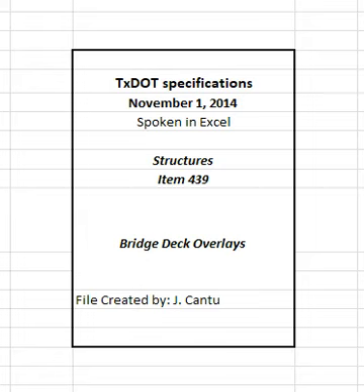Overlay application equipment only is allowed to drive on the prepared deck surface or on any intermediate course during the overlay application as long as these surfaces are not contaminated or otherwise damaged. Protect all prepared surfaces from subsequent contamination, and remove any contamination found on the deck or intermediate courses after initial preparation. The deck surfaces will be inspected for presence of contaminants immediately before placing sealant or any course of the overlay system. Apply the sealant or first course of the overlay within 24 hours of surface preparation, and place all intermediate courses of the overlay within 7 days of initial surface preparation.